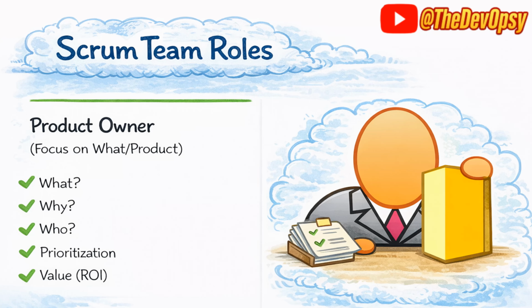The PO, product owner, maintains the product backlog. He prioritizes the items, but he cannot prioritize by himself. He can prioritize with the dev team in the picture, right? He can ask, okay, how much time do you think this particular item will take? What are the technical difficulties or challenges we will face? All these things, maybe with the help of the dev team, but the responsibility of the backlog lies with him. Backlog is nothing but a set of work items which have to be completed in order to achieve the end goals. That is created and maintained by the product owner.